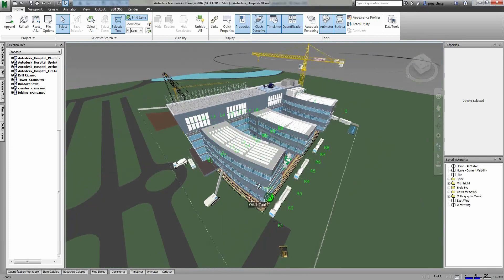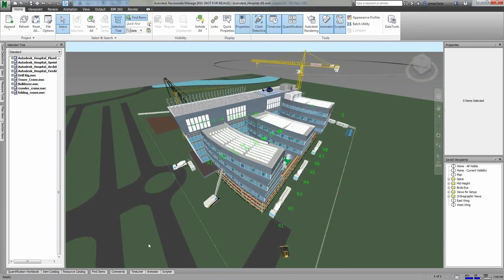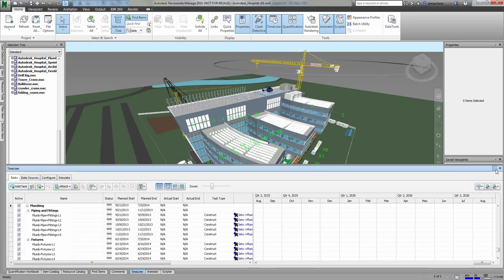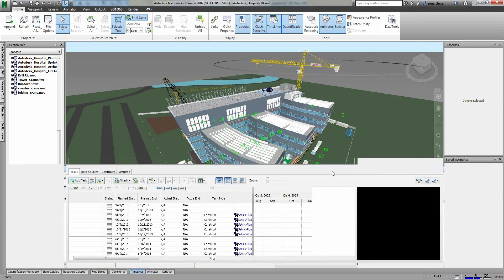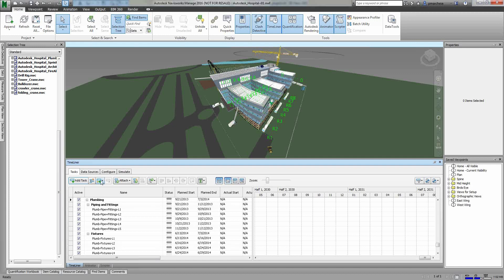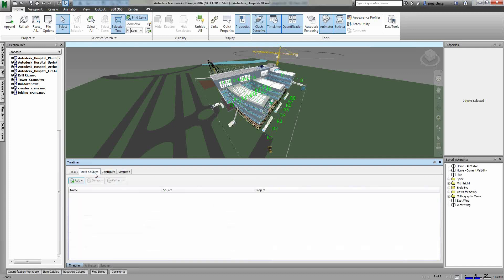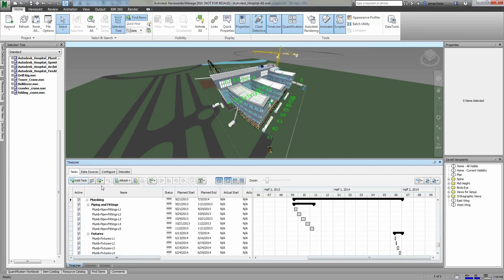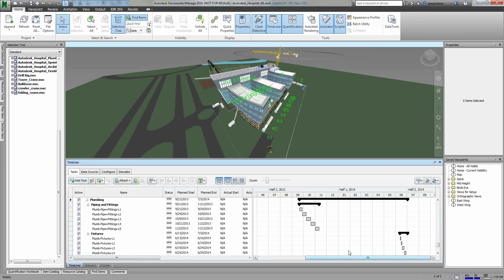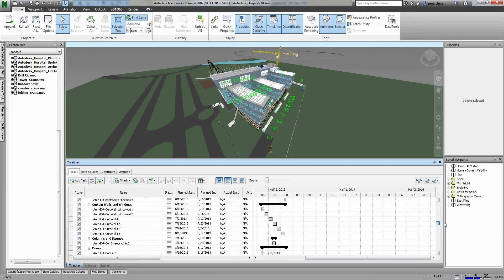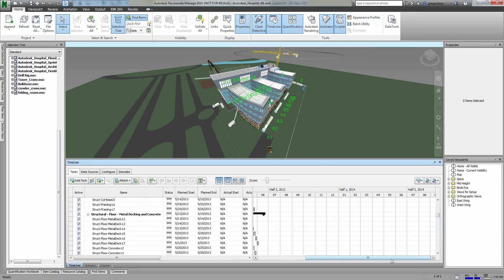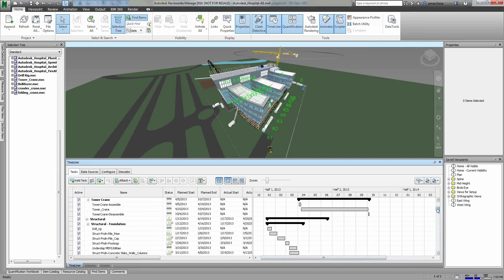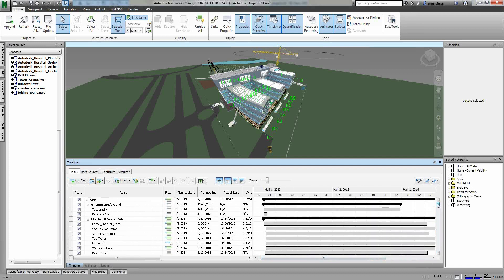Now, within this model, there's a tool that's already set up called Timeliner. Timeliner allows me to bring in a lot of information, and I can either build it inside the project that I'm currently in, or I can actually import this. In this case, I look at my data sources and they're blank. However, if I had something from Microsoft Project or Oracle Primavera, or just a regular CSV file, I can bring in that file and utilize that to manage my actual schedule. I can say what elements are happening when. If I scroll up here, you can see the project timeline and what elements and groupings are laid out.